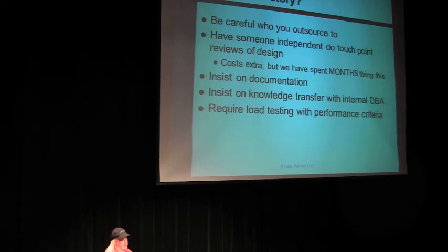Have someone independent of the outsourcing agency, either an outside consultant or an internal senior person, do touch point reviews of the design throughout the project. Don't just wait till the end deliverable and then see what comes out. It will cost you a little extra, but it could save you months. In this case, it has been,